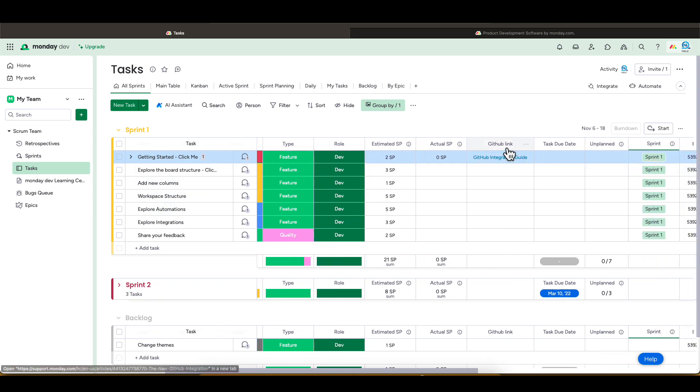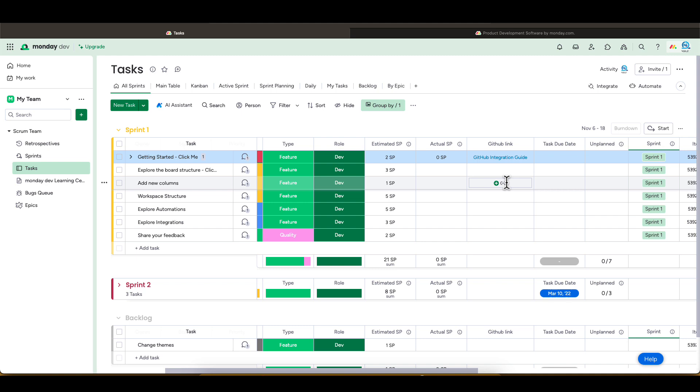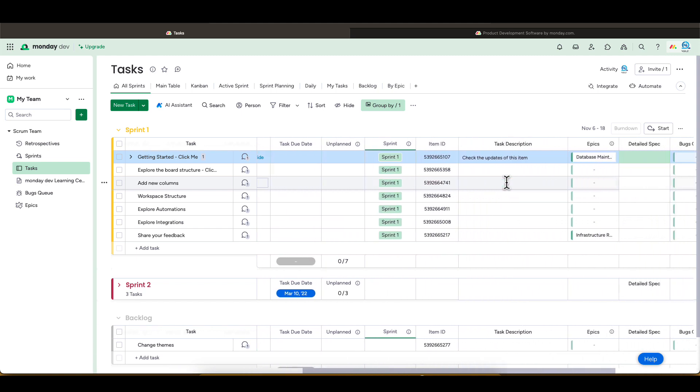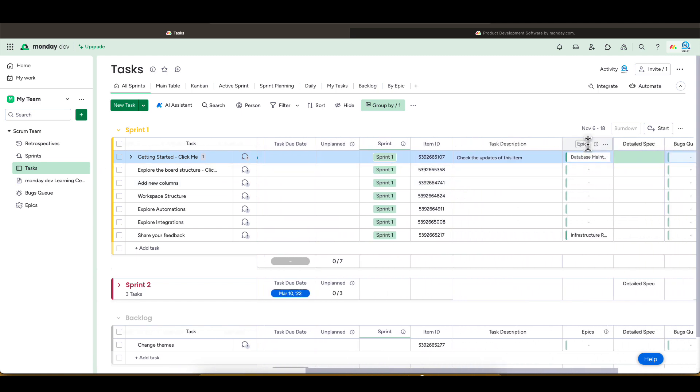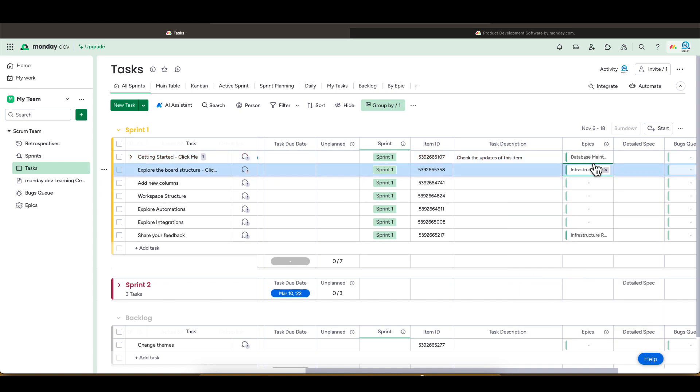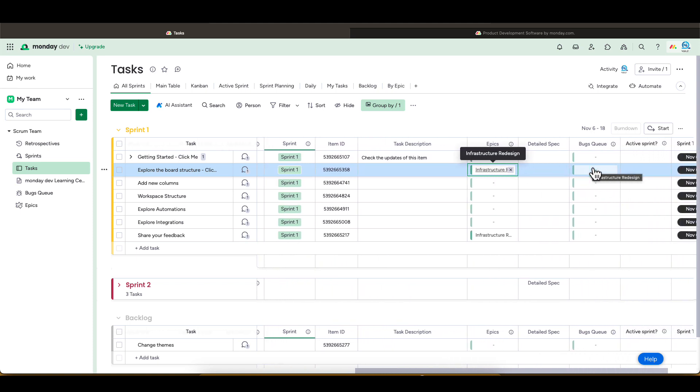This other column shows you can pull information from GitHub once you integrate the applications. There are other columns, for example the Epic column. The Epic is used here as the parent of a task or user story. You can map multiple tasks to an Epic. We will see more on this under the Epic board, which we will review in a second.